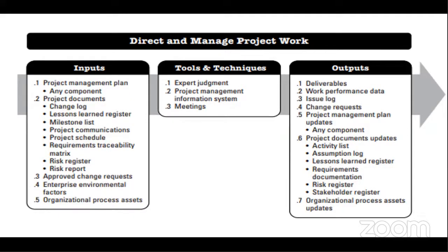Okay, so the risk register. Let's assume you're using job hazard analysis to conduct your risk assessment for a particular project. That job hazard analysis will contain the breakdown of all the tasks in the project. Then it will also contain the possible hazards for each of those tasks under the project. Then it will tell us the control that will be required, and if there are recommendations, there will be recommendations made.